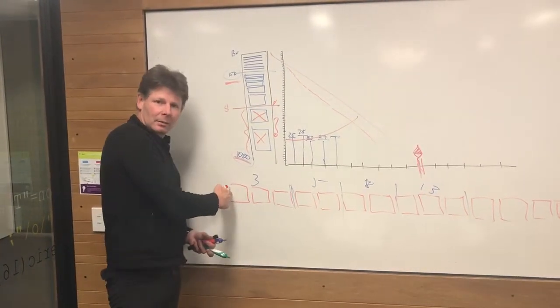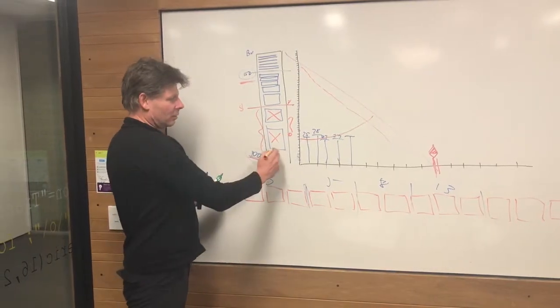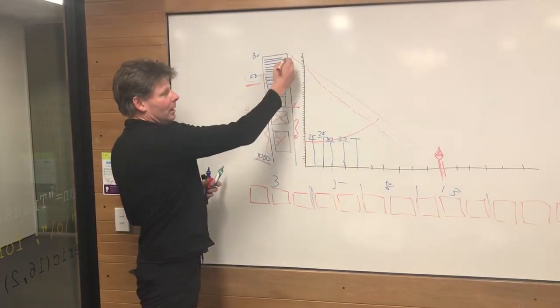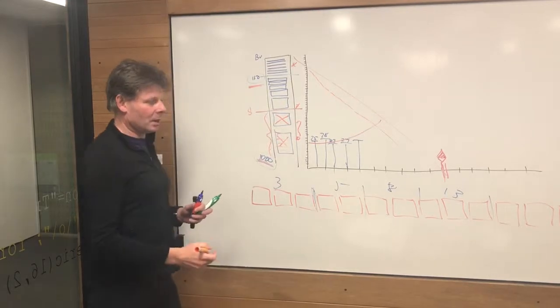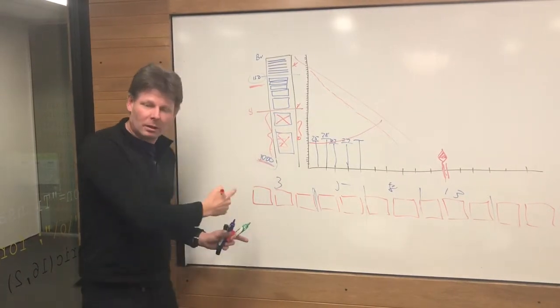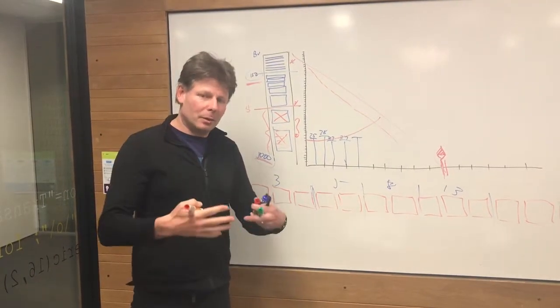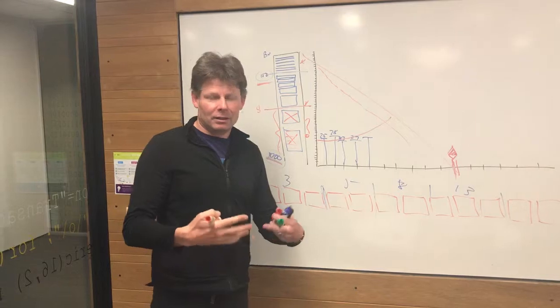I used affinity estimating, which is a very broad brush way to estimate the whole body of work. And this stuff here was quite vague because we hadn't refined it as much as this stuff which we'd already done. But it was an easy conversation to have. So as a product owner, it's something that you can do to work with your stakeholders, to guide them and give them early warning of what can be delivered in the time that we've got.